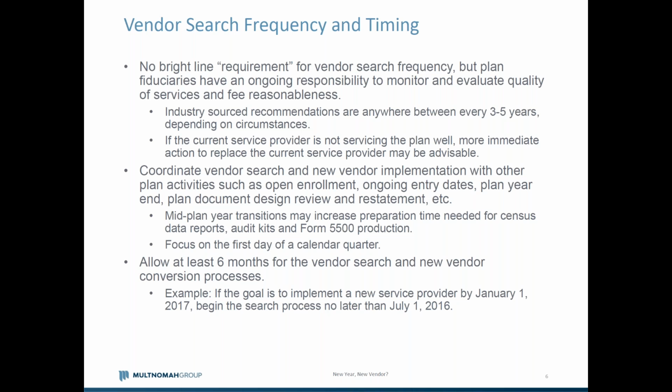So we are seeing more plans do kind of mid-year transitions. Those mid-year transitions can potentially increase, for the year of transition, the time it takes to pull together data for testing and 5500 production, as well as the audit. But typically, I would say the benefits of not trying to cram in a search or a vendor change at calendar year end outweigh the pain of a mid-year transition. It certainly has gotten easier as technology has improved from a record-keeping perspective, but something to keep an eye on is when through the calendar year you may want to be making changes.